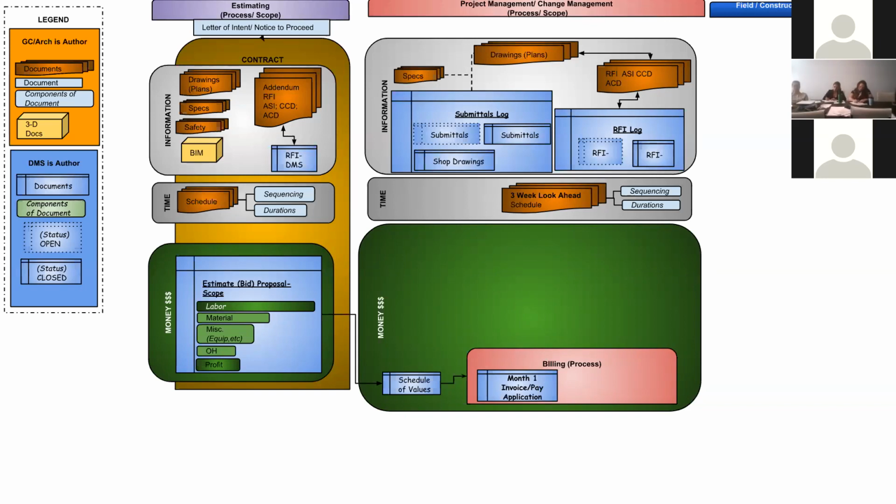They want to break it up into segments to say, okay, well, how much is it? Well, on average, using just simple math, if you had a $5 million project and it was 5 months long, you would have an average billing of $1 million a month. That's if you average it out.